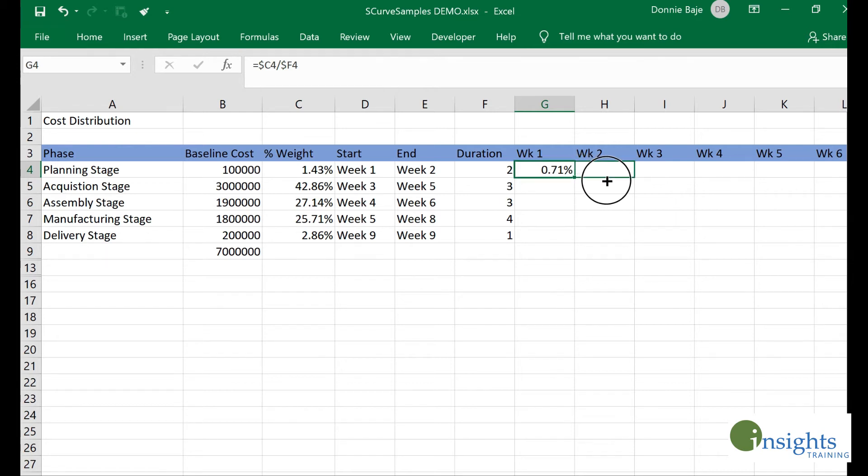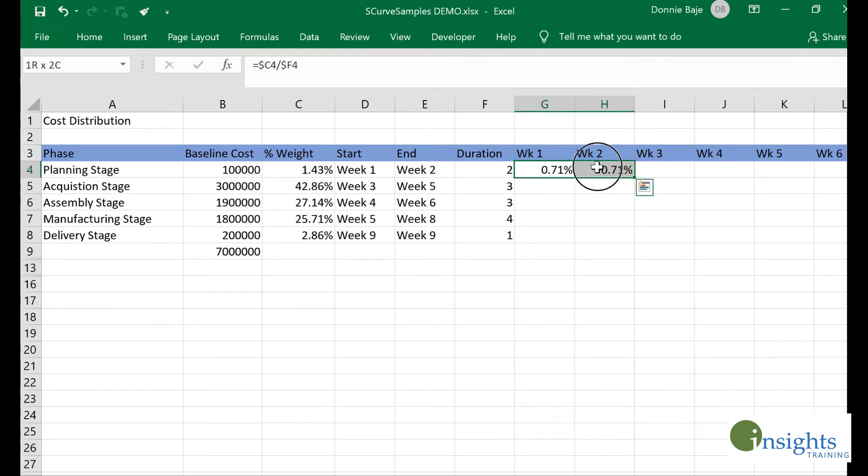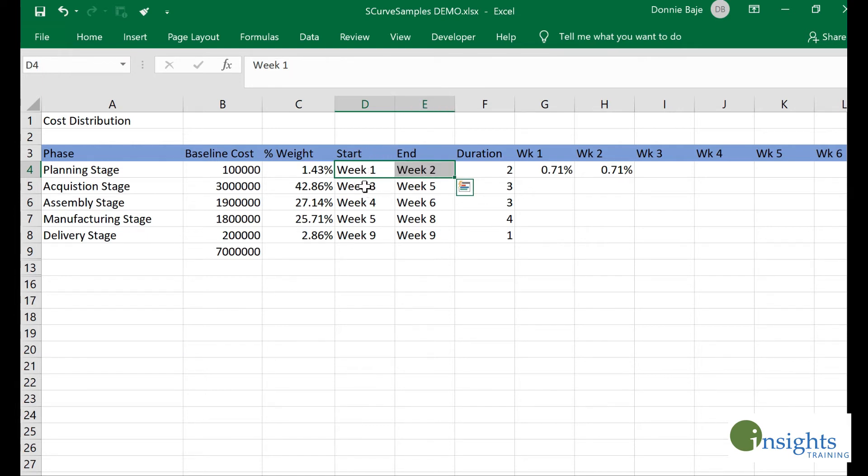That should be the same with the second week. As you can see, the weight 1.43 has been distributed evenly between week one and week two because those are the weeks this stage is expected to happen. Now I have to do the same for the other stages.